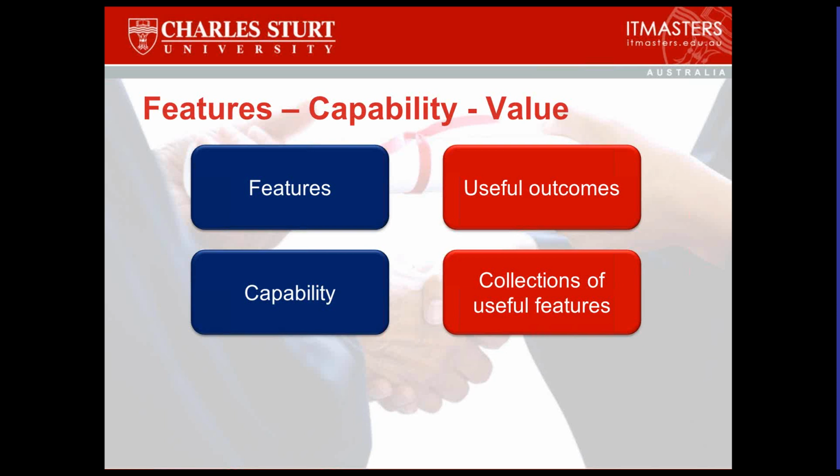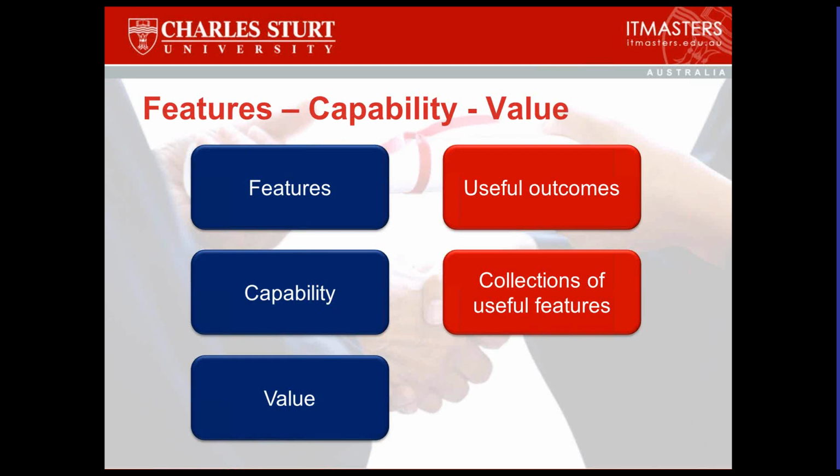Now, that might not be the end of the project. That might be only a small portion of what the entire project is, because the entire project might be a complete CRM system or even bigger. But that segmentable, sectionable piece of capability could be a shippable thing. We might say, well, look, here's the sales reporting stuff. We can give you that. You can start using that now whilst we continue to build the next interesting thing.